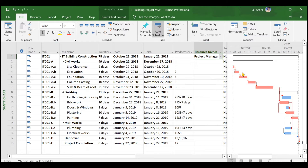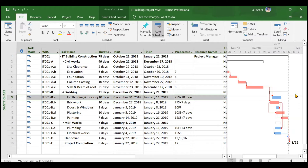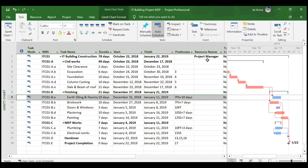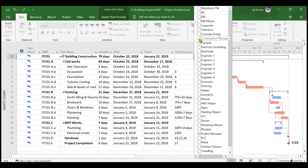If you assign the project manager individually to, say, earth filling and brickwork, it will be a duplication — two project managers will be assigned for the same date, doubling the cost. That is not ideal. Common resources must be assigned at the summary task level only. We will now assign the construction manager as the second common resource.